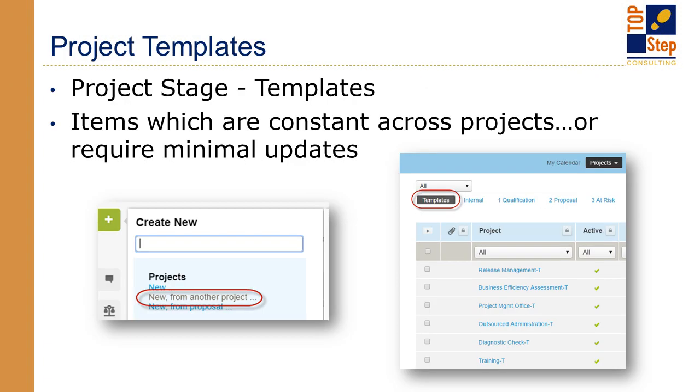We're going to start off with project templates. Templates are a predefined project structure that you can use to simplify project creation by having employees copy the template when creating a new project instead of creating the project from scratch. So what that does is it streamlines the setup process and standardizes the task and phase structure for reporting, which helps maintain consistency.